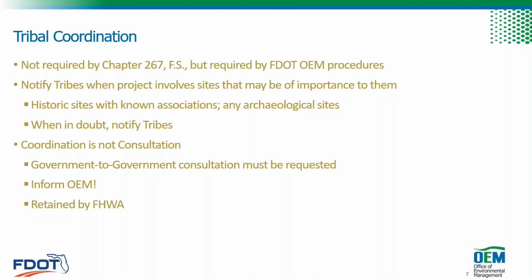Now, if a tribe requests government-to-government consultation for a federal project, you will need to inform us at OEM. We heard Jason talk about this this morning, but our day-to-day correspondence with tribes is what we consider coordination, but formal government-to-government consultation is still the responsibility of FHWA per the NEPA assignment MOU. So if you get a request from a tribe for government-to-government consultation, you can let me know at OEM and we will route that up to FHWA.